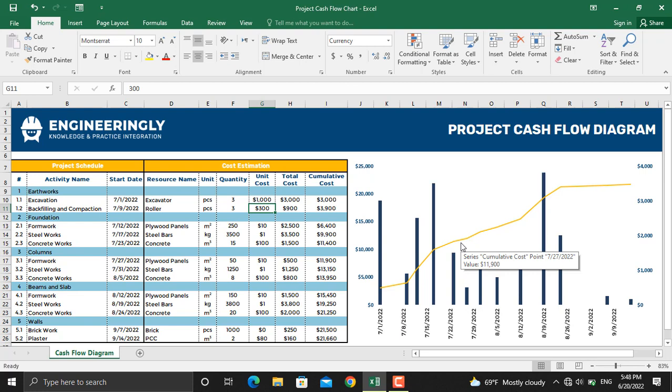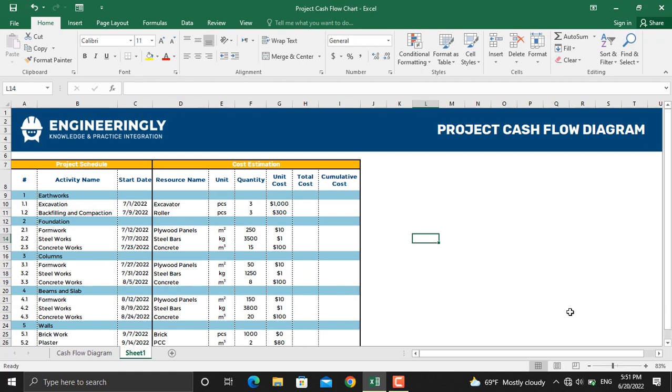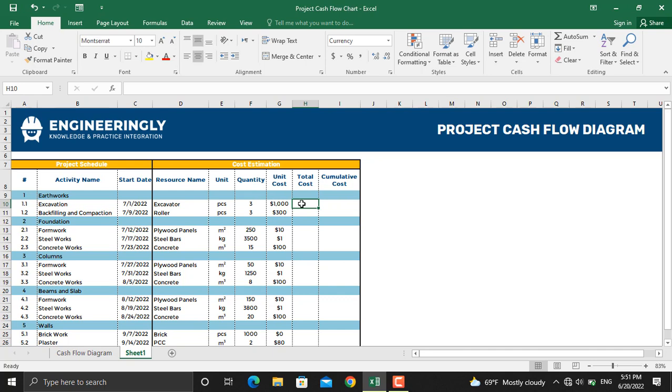In today's video I am going to show you how to prepare this diagram using Microsoft Excel. Now in order to get started, you will have the list of your activities, their start dates, the resource name, the resource unit, the quantity that you need, and the unit cost. We will calculate the total cost of each activity.